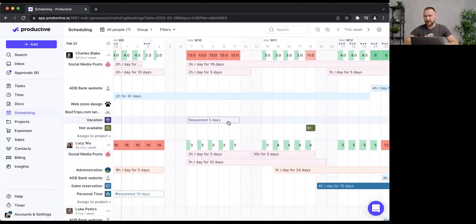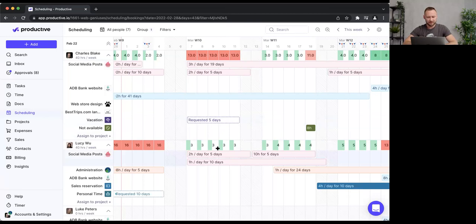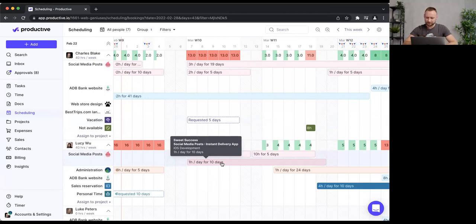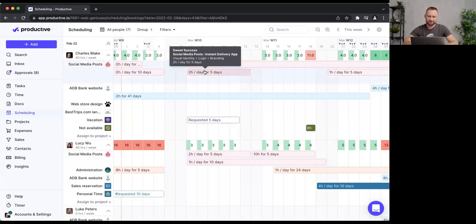How do you know if you can move a booking to someone else, or whether you've over-scheduled? These squares show each person's capacity. Lucy's capacity is set at eight hours, but I've only booked three hours so far — that accounts for all bookings in this particular week. Lucy still has five hours available per day.